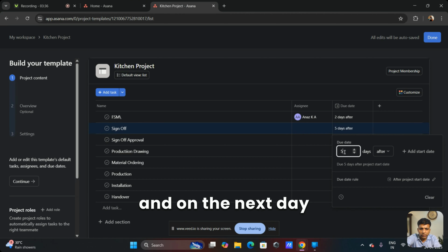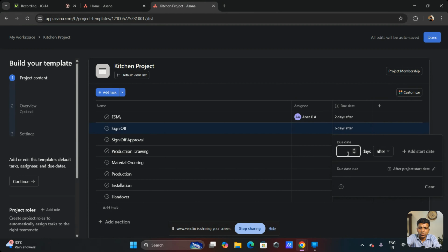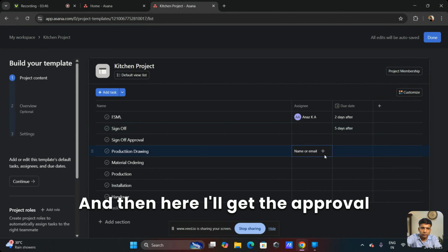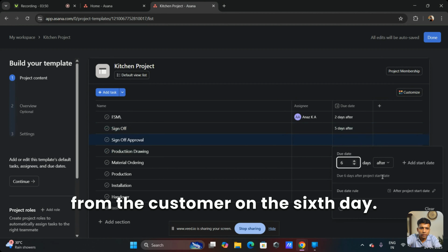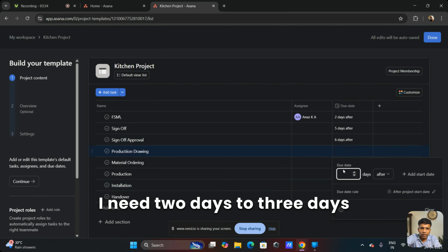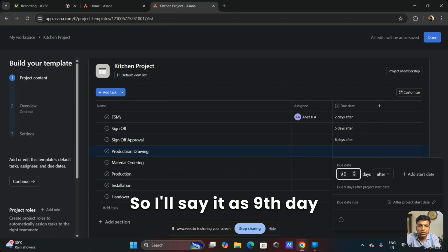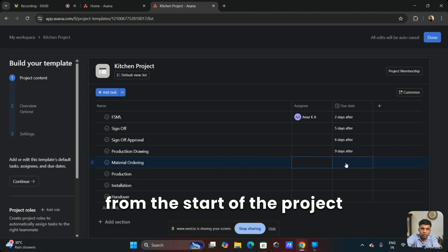On the 6th day I'll get the approval from the customer. Then for the production drawing I need 2 to 3 days, so I'll say it as the ninth day from the start of the project.